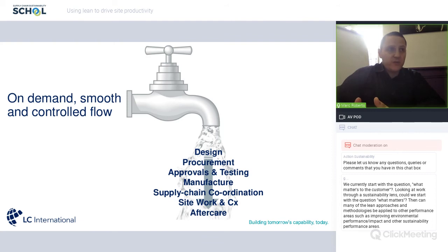And quite often we've missed the biggest opportunity. Fundamentally we should be asking, what's stopping, or what has the likelihood of stopping, these guys putting up the bit of steel or laying that piece of concrete when we actually need it? As soon as they're ready to pick up that baton, what's stopping them from picking that baton up? Have they got the right design in place? Is the area available?